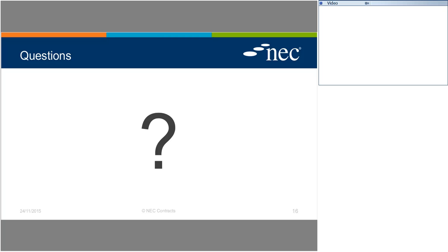What's the first question? What if a contract for a project situated in the UK and subject to the laws of England and Wales includes W1 and not W2? Well, reading between the lines, and assuming that the person who asked that question was also saying it is a construction contract for the purposes of the Act, then the parties, if they are still collaborating, could agree to use W1. Yeah. But the fallback position under the Act is that something called the Scheme for Construction Contracts will apply instead.